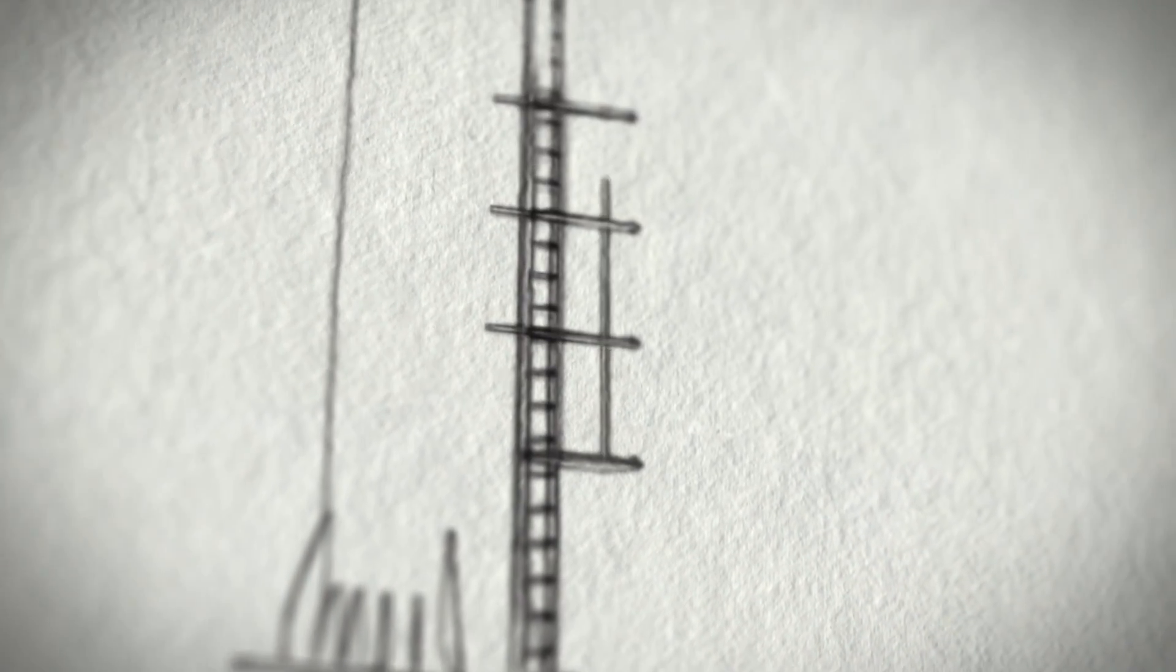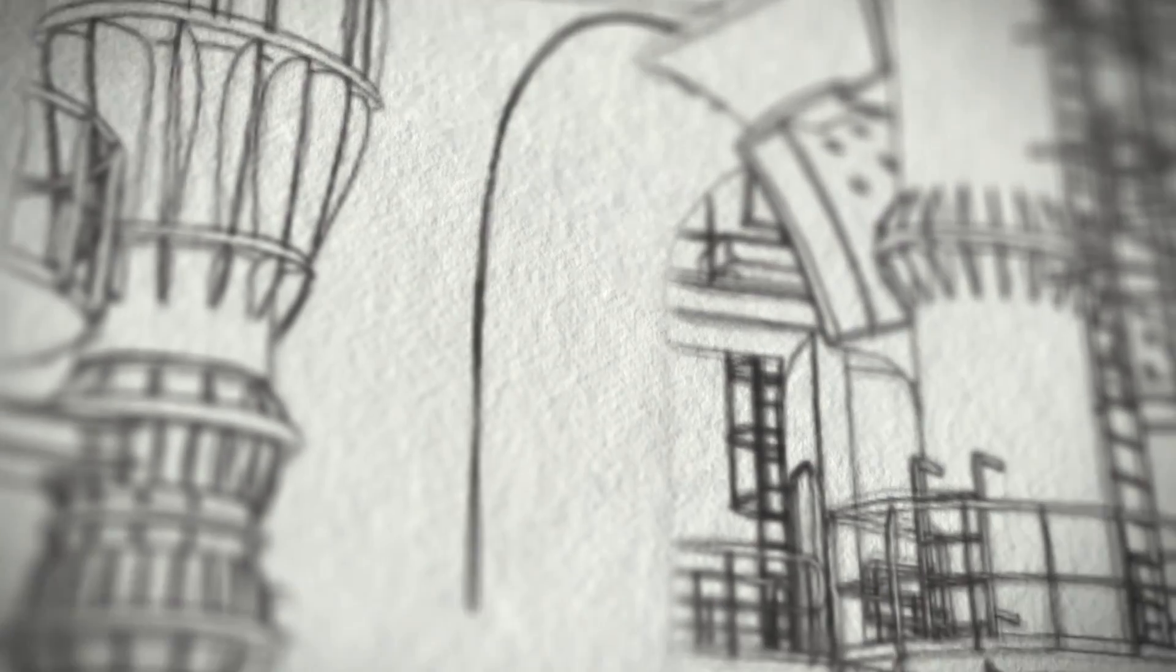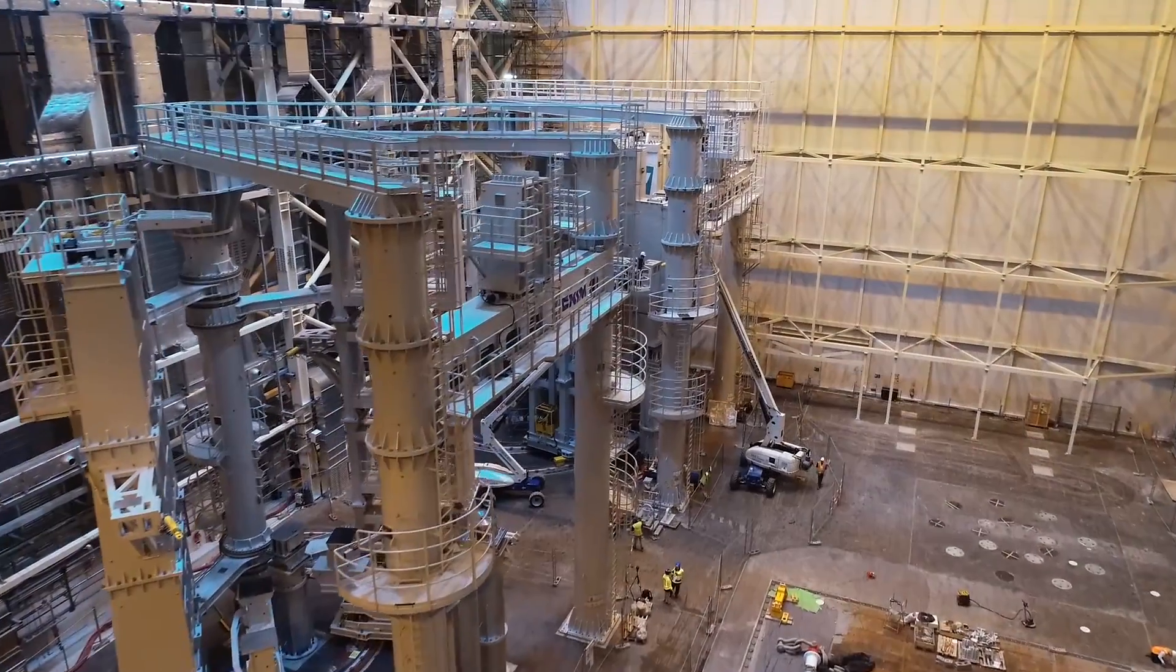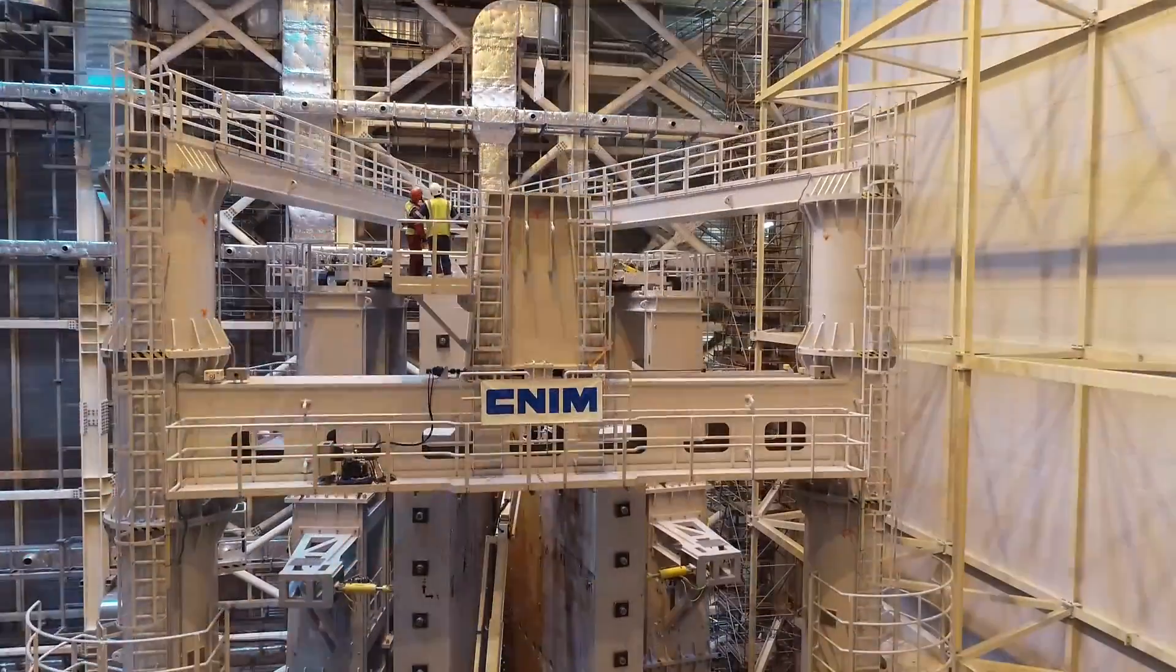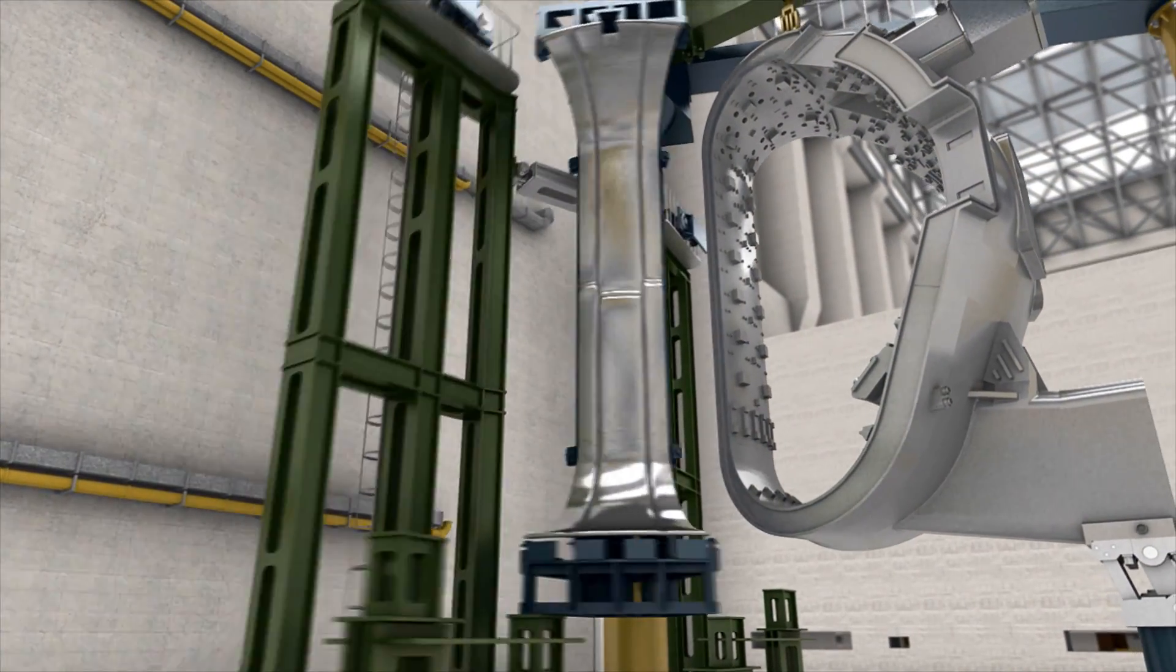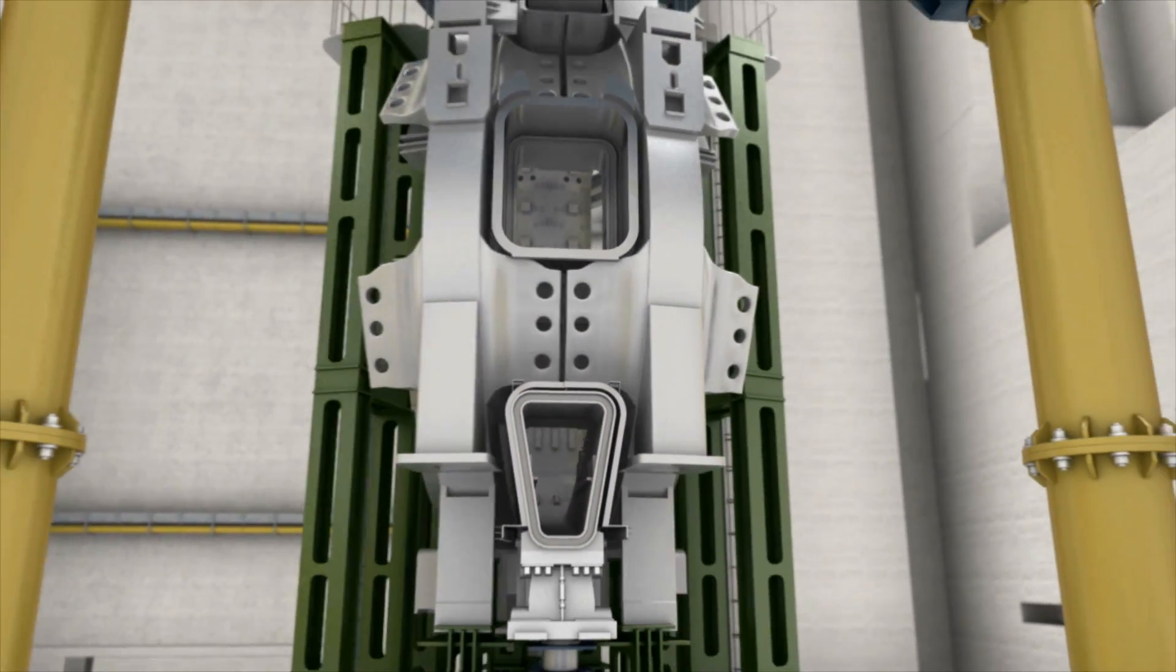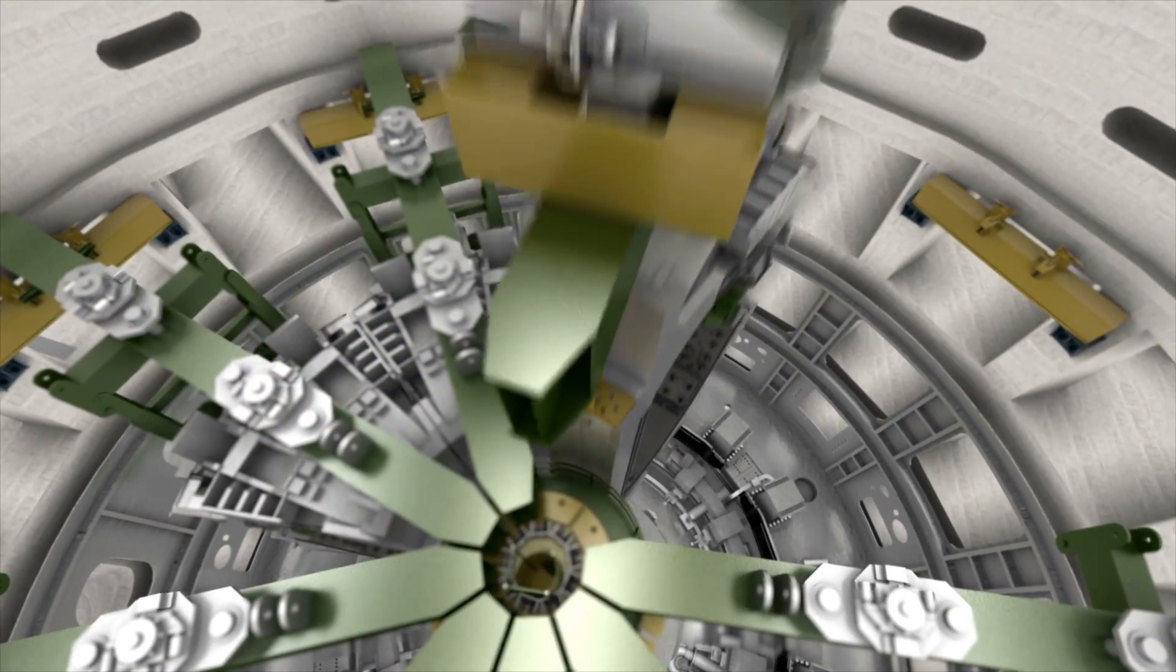While the lower cryostat components are being assembled and welded in the tokamak pit, two giants are standing in wait in the adjacent assembly hall. Standing six storeys high, the purpose-built sub-assembly tools will suspend each of the nine sectors of the vacuum vessel in turn, while thermal shield panels and toroidal field coils are rotated into position. By the end of this year, the first completed sub-assembly will be transferred to the tokamak pit. Eight others will follow.